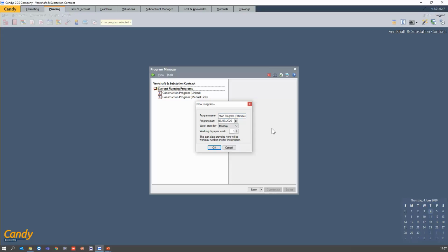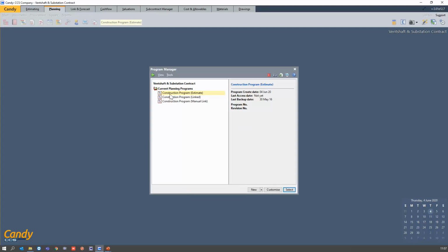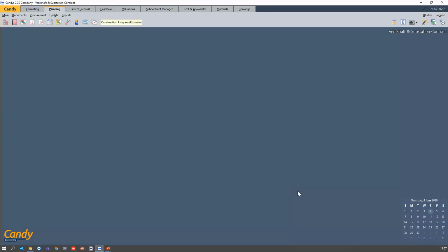My start date is the 6th of January 2020. My week will start on a Monday. You have the option to start it on a Saturday or Sunday as well. And then my working days will be 5 days per week. Now I have created my estimate program and I will just select it.